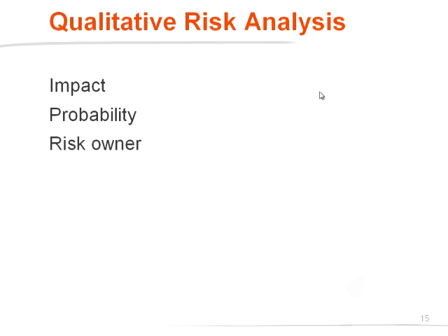Right. What else do we need? What people usually forget, you need a risk owner because the project manager is not the technical guy. For example, I did a lot of software development, but today I don't dare to be a risk owner, because there are the software developers who know exactly about their risks, and I choose a risk owner from the team who is accountable for the risks.